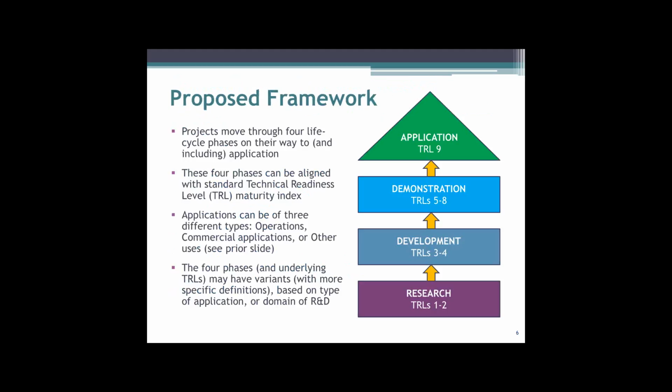So one way to consider how to measure our performance is to develop a conceptual framework. The one we have proposed in NOAA is based on the concept of a technical, or sometimes technology, readiness level, which was originally implemented within NASA. It lines up on the phases of a development cycle, going from research, things that are in a conceptual mode, to development, to demonstration, and eventually to applications. In the case of operations, or R2O, it would be operations.